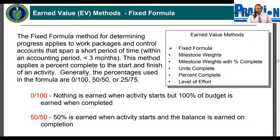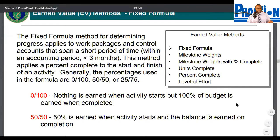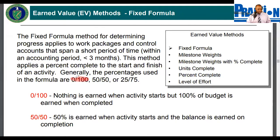The fixed formula method applies to work packages and control accounts that span a short period of time within an accounting period — less than three months. This method applies a percent complete to the start and finish of an activity. Generally, the percentages used in the formula are 0/100. That means you cannot claim any of the earned value until 100% of the task is done. 50/50 means you can claim 50% of the earned value the moment the task starts, but you do not claim the other 50% until the task is done.